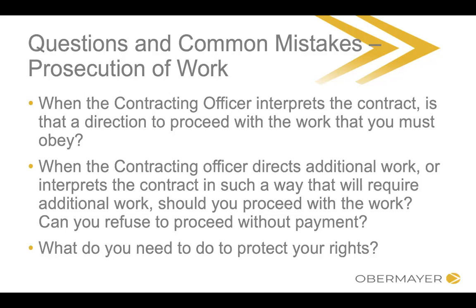That specifically can be true in the constructive change context, where sometimes the government's not admitting that it's a change. They're saying, no, my interpretation is this is within the scope of your contract. And you're saying, no, my interpretation is that it's not within the scope of my contract. The only thing you can do in that scenario is cover your bases, give the notice that we required, and then you file your REA or you file your claim. And while you're litigating with the government and arguing about whether or not you're supposed to get additional time or money, you are legally required to continue prosecuting. In other words, continue performing the work.